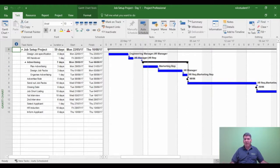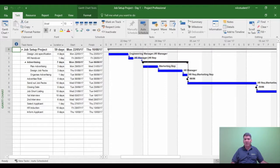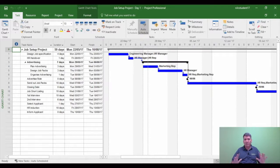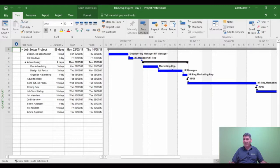So at step 10, we now need to make sure we set a baseline just before the project goes live. Everyone who has been involved in the project, all the stakeholders and all the people who put the resources together, these people now have to agree that the project is set up to its best possible way of working. Now what are we agreeing to? We're agreeing to everything. When we look at resources in project, everything that's been assigned to a task, that's all been agreed.